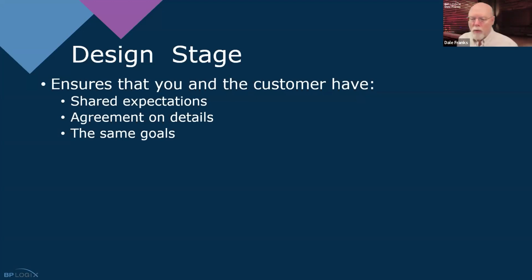And of course, you all want to ensure that you have the same goals before you start developing. All of this stuff should be done and completed, and you should have agreement, sign off, approval of time and costs and all of that before you begin working inside Process Director to actually build this thing.